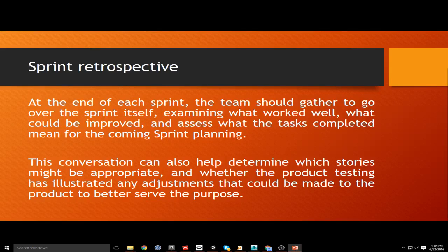Each time you come through, you look at your backlog, take the stories out of it, break those into tasks, put them on the board, have your daily stand-up meeting, move them into in progress, and then into done, and then bam, you have your delivery of your sprint and your retrospective, and then you do the whole thing again until the product is finished.